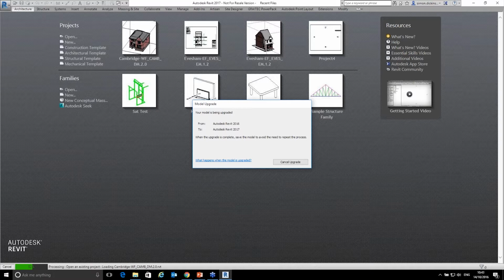And 25% reduction in construction waste. Basically, the quantities that we took off were very accurate. In fact, sometimes I'd say they're too accurate because it tells you the exact amount you're going to need. All you need then is a good QS that just needs to add the correct amount of waste onto it, but you know that the value you've got is the exact surface of brickwork minus all the windows. We understand exactly how that's going to work. So let's have a look at this actually in practice and see how this actually works there.